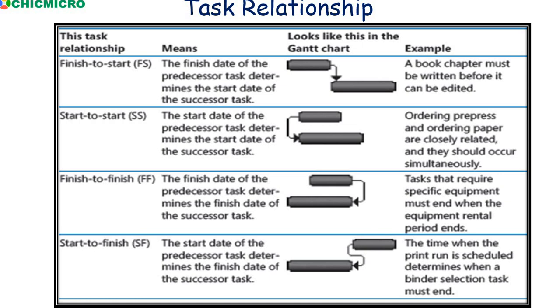Another example is maybe when we are designing an application. If we finish the home page, we can also finish the main body of the application. So that way we can actually link two tasks together, finish to finish. So they finish at the same time.